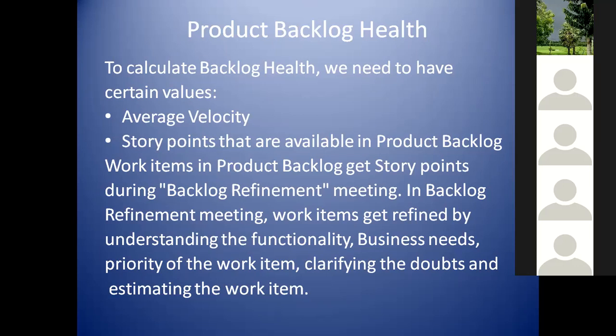So all those things will also affect your requirements. If you refine for your next 6 months, that means you are ensuring, okay, these are the things I'm going to work on. But if suddenly some changes come, again, you need to refine that, and sometimes it may happen as a duplicate effort, or your previous work may go to waste. So you need to ensure what level you need to maintain.